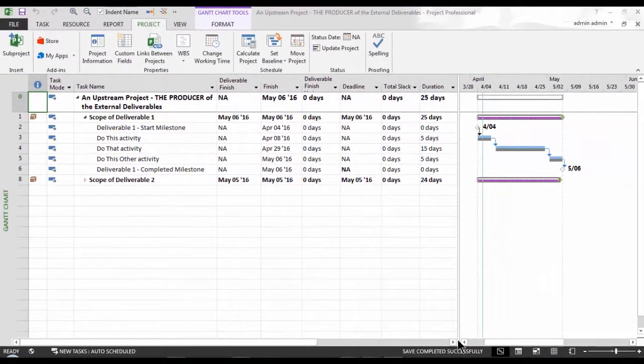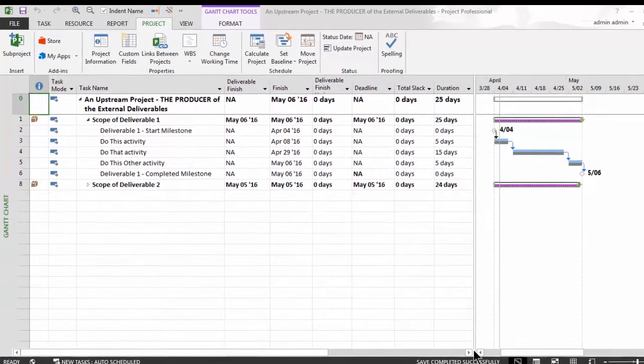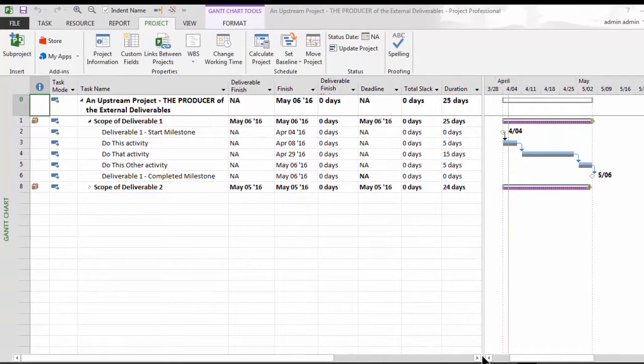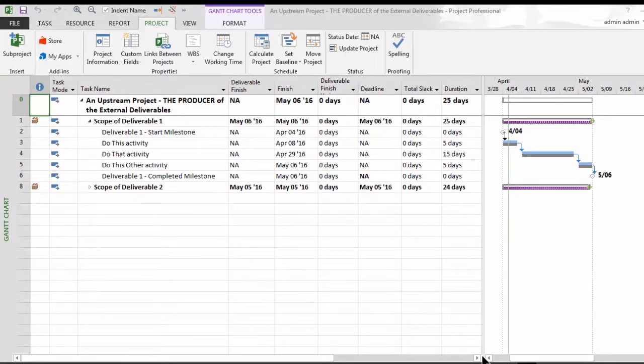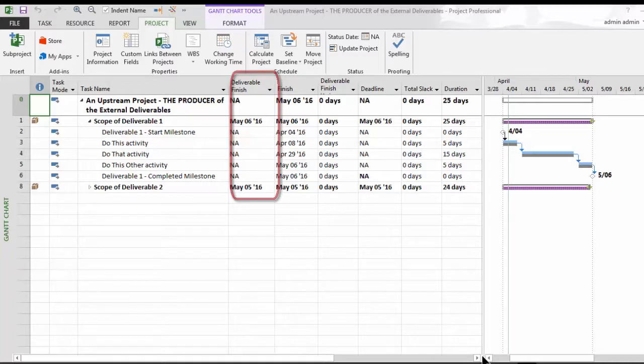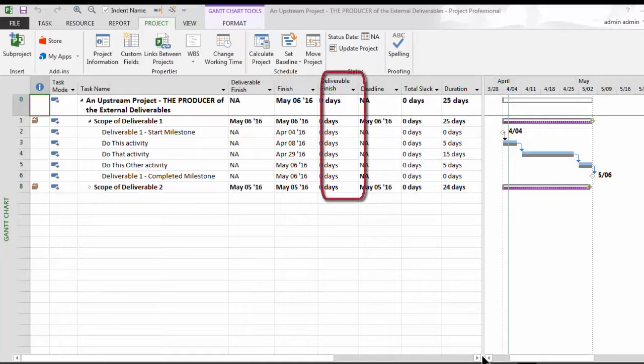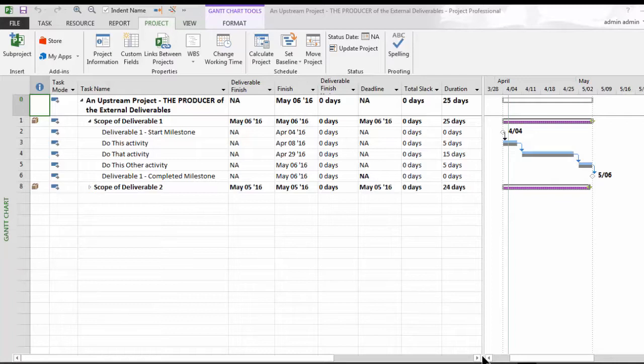Now, let's talk about our third and last topic, practical tips. I have gone ahead and opened the upstream producer project. I insert it here, deliverable finish date, that is our deliverables commitment date, followed by the planned finish. These fields can be used to compute the variance, that is the difference between these two as I have here. This helps to track delays on each deliverable. Also, in order to help bring attention to any delays and to help maintain focus on the critical path of our projects within our program or portfolio, use deadlines. I have added deadlines here to my two deliverables, one and two, on rows one and eight.